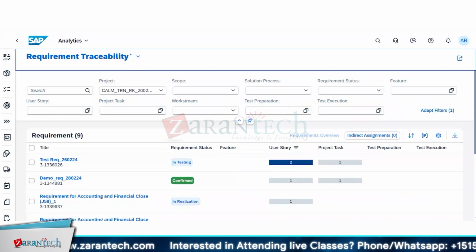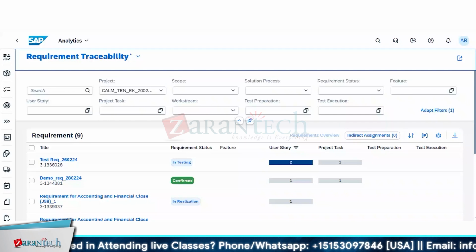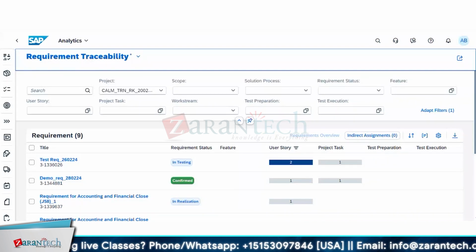In the sense, the testing team, obviously with inputs from the work stream lead and the developer, right? Okay, what needs to be exactly developed? So that can run and should run parallel, so that you don't lose time between the two phases, where development is complete and ready for testing, but your test preparation is not done. Then it will take again some time for the test team to create test cases.